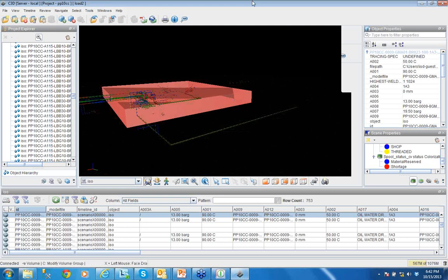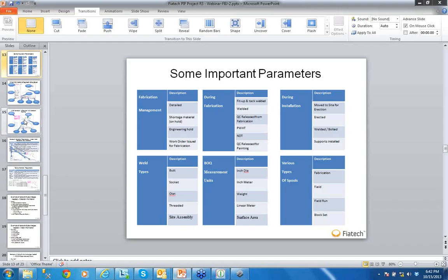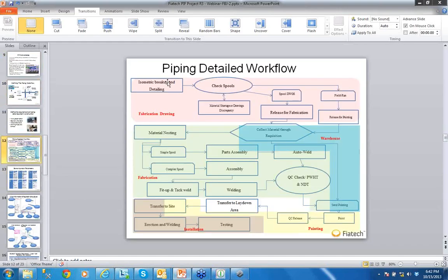Okay, now I will tell you how we are doing it. How it should be done, basically, we did not think about it a lot. Whenever the data is being detailed by Solinas, at this stage, the breakup is done and the data is being exported, we normally have a checker who randomly goes to check, and at the same time we have some small routines which cross-check the 3D database with the output of the detailing database.